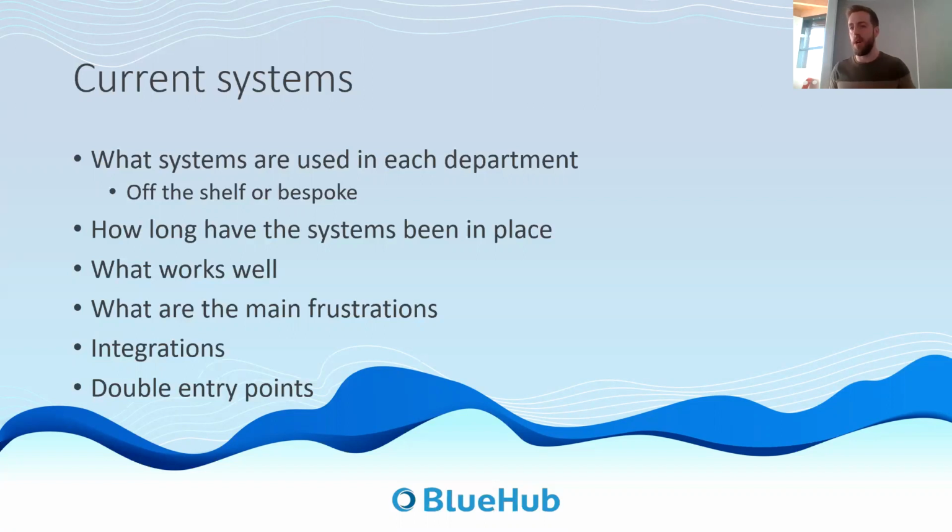So anytime someone's got a bespoke system, we really want to go into quite a lot of detail with what that current system covers and what it doesn't cover. And ideally, you need to make sure they've still got contact with the current developer. So if someone's got a really old system, it's bespoke, and they have no contact with the developer, even we take on those jobs very hesitantly.